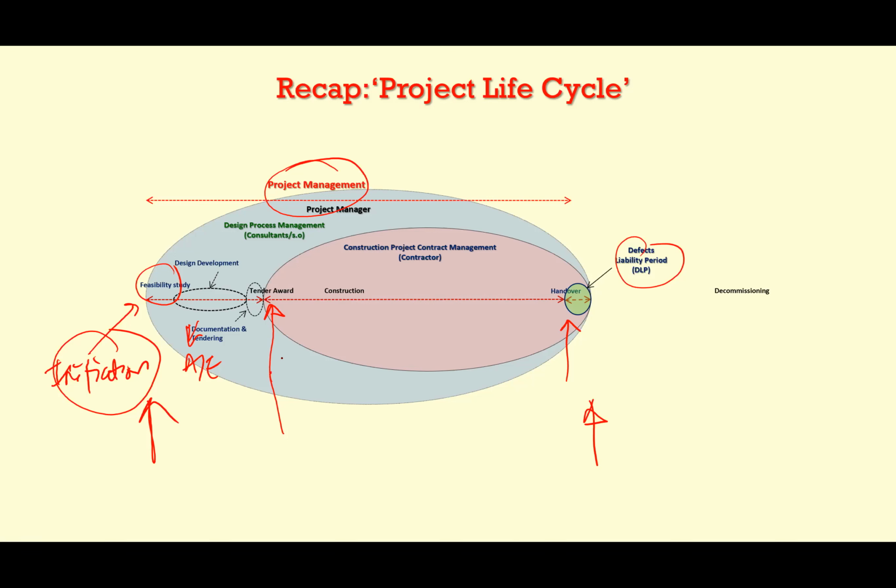To make it official, they need to sign the contract, submit a few things, etc. Construction starts when the contractor is given site possession, access to enter the site. So let's say entering the site is this point. That is when the contract period will be counted.